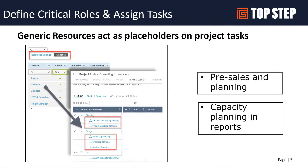Once you have a well-defined list of generics, customers typically create project plan templates. Those templates include phases, tasks, and the generic resource, and can include expected hours for those resources as well. That becomes the starting point for project management — it's really good for project pre-sales planning as well as capacity reporting.